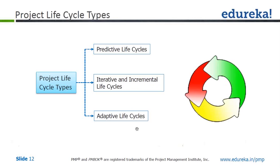The third one is adaptive life cycle — this is nothing but your agile method, also known as change-driven. Agile is a name known to everyone. It is similar to iterative and incremental life cycle, except the iterations are very rapid, around two to four weeks. In iterative and incremental life cycle, the iterations could be two to four months.